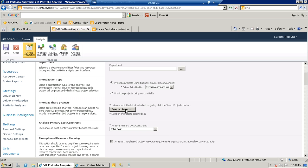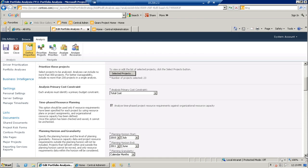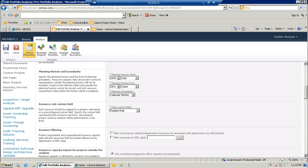I can select the projects which I'm going to include in the portfolio for analysis. I typically will want to have all the in-flight projects as well as any new projects that are proposed to kick off in the near future. I can then look at constraints such as resources or cost. In this case, we'll look at total cost as a constraint that we're going to apply to the portfolio. And then I can choose a time horizon for that analysis. In this case, we're going to look at a one-year time horizon based on the fiscal calendar year.